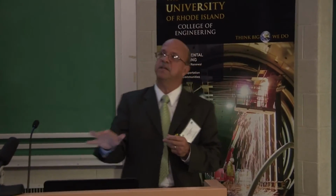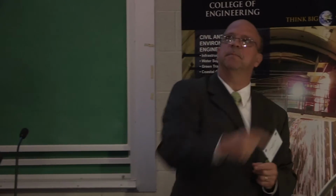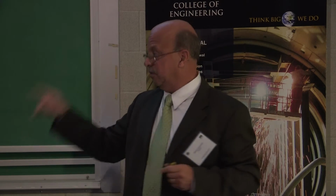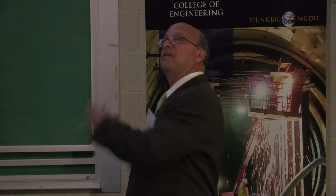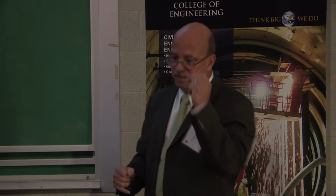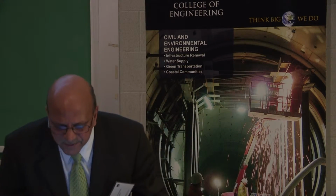And it was truly amazing in Sekonic, because we could have 10 trucks lined up, maybe 20. And our acceptance crew would pick number 5, and if that flunked, well, everything else was gone. They just turned around and left. A contractor would turn around, look at his QC and say, you're responsible. The contractor had somebody he could hold responsible, not the state. So it really worked well.